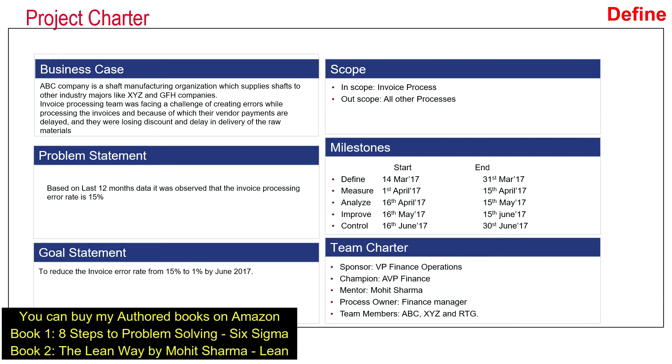The next is the problem statement. Problem statements should always be data-driven. So in this case, we have said based on the last 12 months data, it was observed that the invoice processing error rate is 15%. The goal should be SMART: specific, measurable, relevant, attainable, and time bound. In this case, the goal statement is to reduce the invoice error rate from 15% to 1% by June 2017.